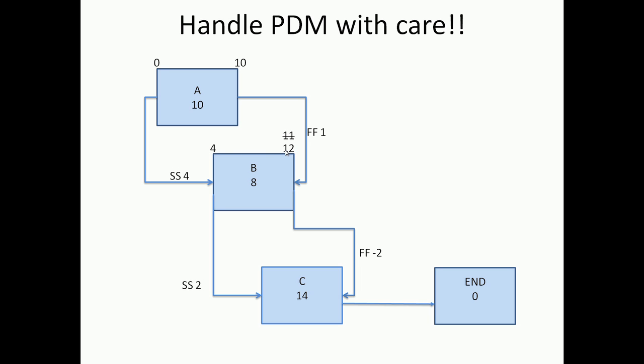One of the options is for B the early finish could be 12, or if I come with the other relationship, the finish-finish relationship from A, A's early finish is at 10. If I use the finish-finish relationship, it should finish by 11. When I take between 11 and 12, 12 is more constraining. So I keep 12 as the early finish and then move on to the next activity which is C. Here again you have a start-start relationship of 2 between B and C. When I come down to C using the lag of 2, C's early start becomes 6 and going through the duration of C which is 14, the early finish of C becomes 20.